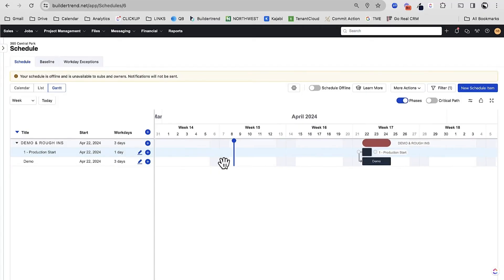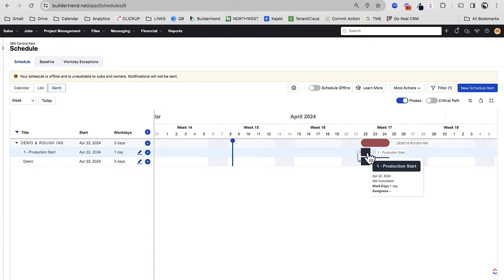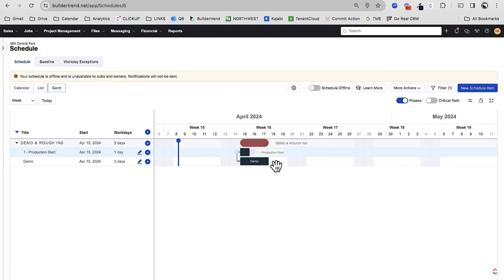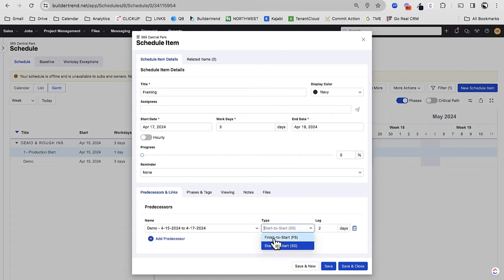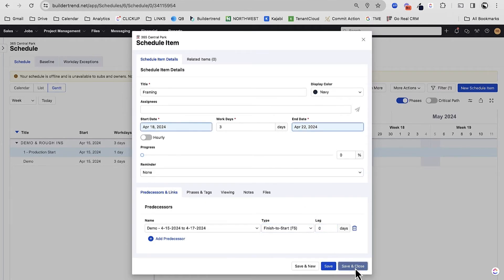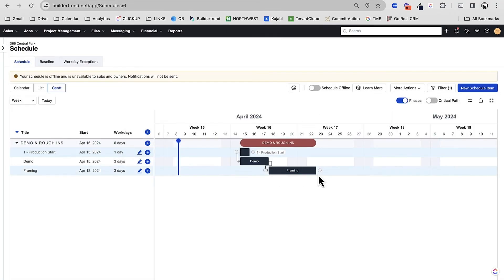Now let's look at a couple of Buildertrend's standout features. First, project management and scheduling — this is where Buildertrend really separates itself from more basic platforms like Jobber or Housecall Pro. Using a simple drag-and-drop interface, you can build job timelines using Gantt charts, set linked task dependencies, and auto-adjust project schedules if there are delays. The project templates are a huge time saver — after creating one, you can reuse it for future projects by adjusting the schedule and adding appropriate crews or subs. Once a project is created, it's easy to track progress using daily logs, which allow foremen or subcontractors to submit reports on who was on site, what got done, and any issues or delays.